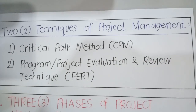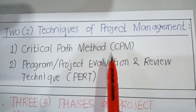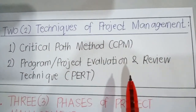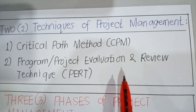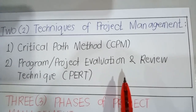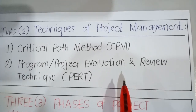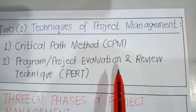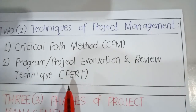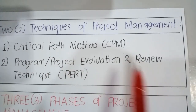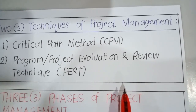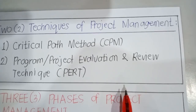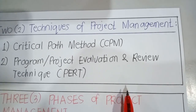CPM, or critical path method, is a network-based scheduling technique used primarily for industrial projects in which activity times are known. On the other hand, PERT — program evaluation and review technique — is a network analysis for planning or scheduling using probabilistic activity time, and is used to handle uncertainty in times.